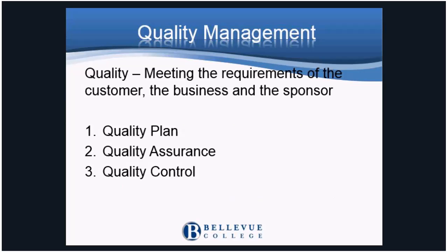During the planning phase, the quality planning portion was to define ways to meet the requirements of the business, the customer, and the sponsor. This includes some steps to break down the requirements into operational definitions and develop objective, measurable requirements, along with the targets and tolerance to define success. The quality plan included the measurements to use that are accurate and precise, that they measure the right outcomes using the right tools and using a scale of measure that is applicable to verify whether we got it right. The quality plan may include any test plans and have the frequency to test.